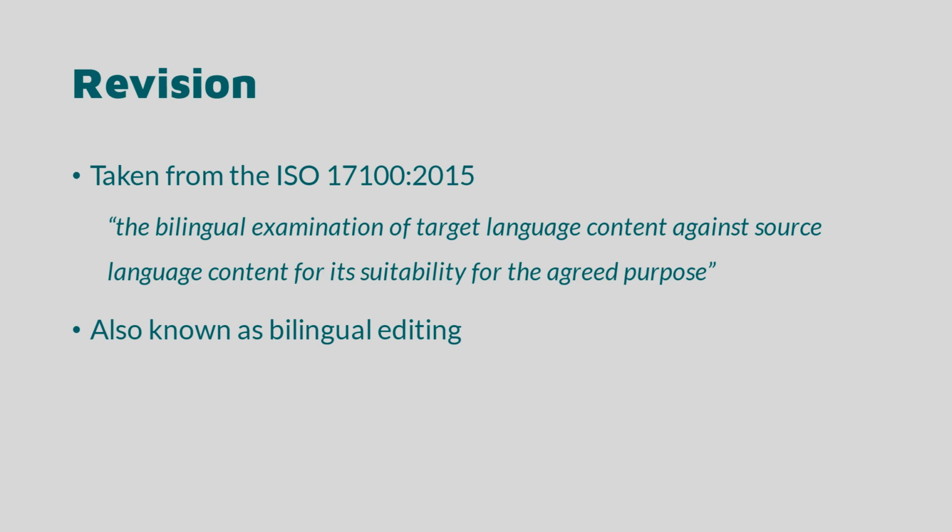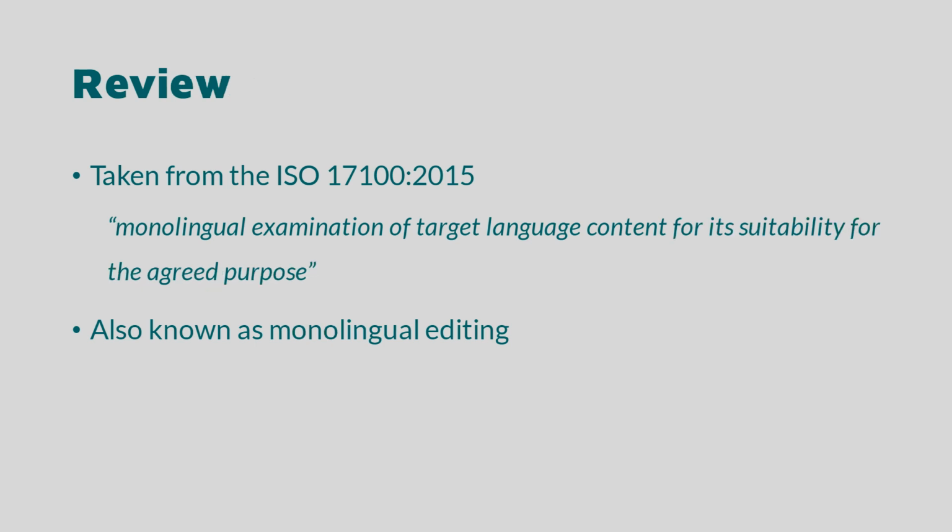The reviser should also inform the project manager of any corrections made or recommended. Once corrections have been made, the reviser will repeat this revision process until they and the project manager are satisfied with the quality of the output. It is worth noting that in this context, corrections may at times include retranslation.